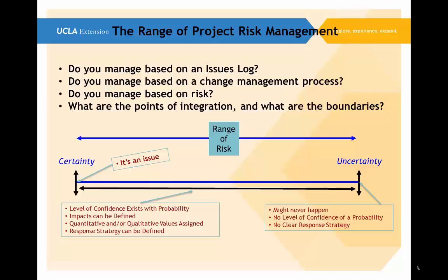But for all the risks that might occur or have a probability of occurrence somewhere in the middle, these we have to consider. These are the ones we have got to concern ourselves with, and we can define the impacts. And then we need to evaluate, qualitatively, like that slide a few slides ago, or quantitatively by numerical analysis of one kind or another, what the impact and the level or category of that risk is and what we're going to do about it.